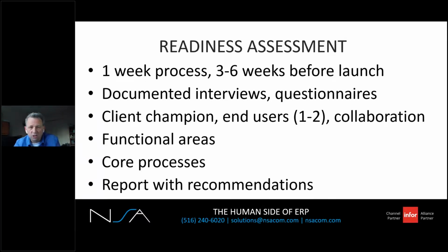Executives are strongly encouraged to attend. It gives them an idea of the readiness. This is important. This is a business. Once complete, you conclude whether a functional area is ready or not. If they're not ready, is there anything they could do to be ready? For example, more practice, or did they just have maybe one process that didn't go well, that if they got 2 weeks to fix it, is that enough?